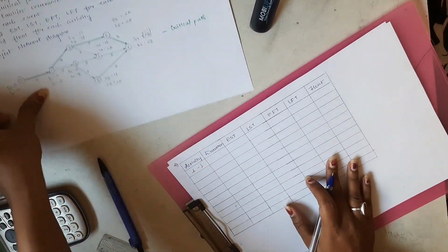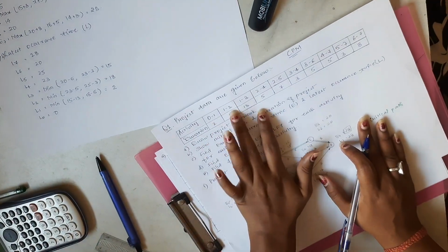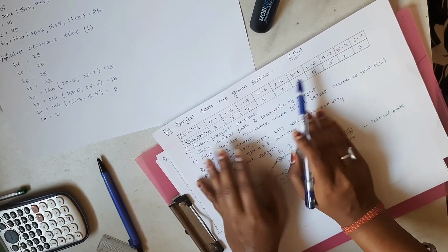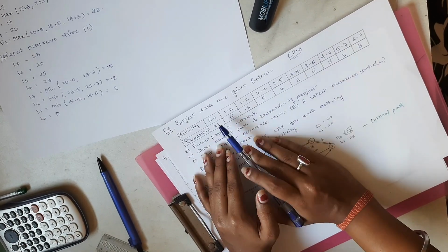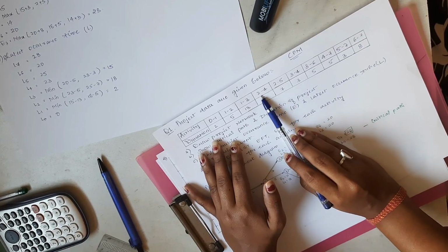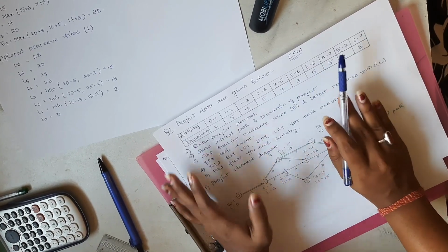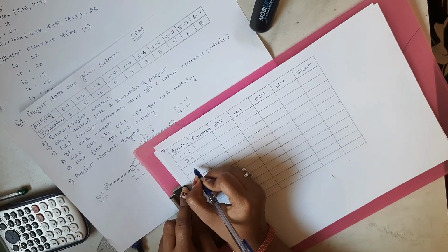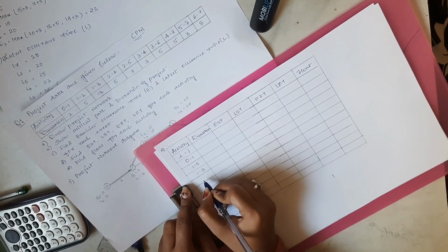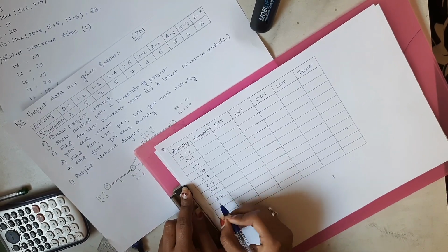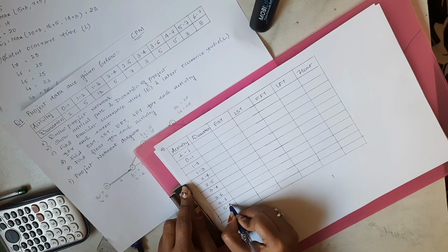Okay, so in our question it was simply given in the order which is required, that is the activity should start with 0, then complete all the other activities which are associated with 0, then 1, then all the activities associated with 1, then 2, then all the activities with 2 and 3 and so on. And in that way our question is already arranged, and we simply need to write down what is given. So 1 to 2, 1 to 3, 2 to 4, 2 to 5, 3 to 4, 3 to 6, 4 to 7, 5 to 7 and 6 to 7.